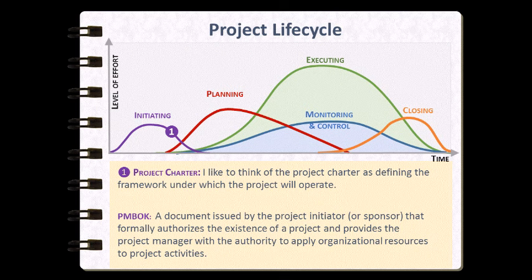I have come to think of a project charter as establishing the framework by which the project will be executed under. The project charter is created within the very first phase of the project lifecycle, and within the document, we focus on providing the project manager with enough information to allow the project to proceed to the planning phase. Thus, we are less concerned with defining the schedule or allocating funds to a particular task as we are in identifying any known restrictions or constraints on our budget and schedule.